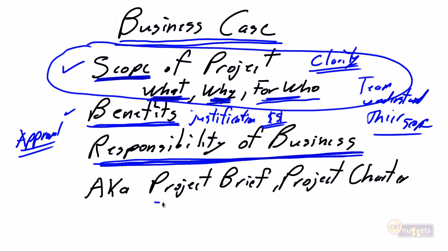And finally, business case is not a unique term for Prince2, but business case is absolutely the term we use throughout Prince2. If you've used other project delivery approaches in your previous life or even to date in your organization, the business case is synonymous with what some organizations call the project brief, or what a lot of organizations will call the project charter.